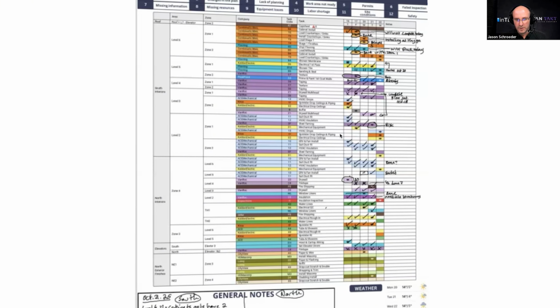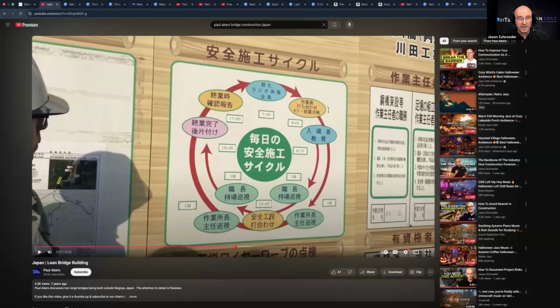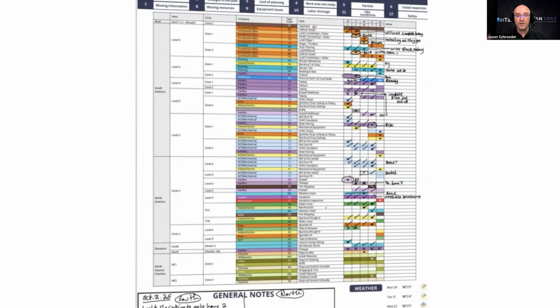And I do want to note that when they're doing this audit, remember, they plan the next day. The afternoon foreman huddle plans the next day. Then in the morning, they orient their workers in the worker huddle. And then they go through and they do their audits. They do their audits with, not Japan, this is the United States tact production system, but that's the time to actually take this in hand and go do your audits and work shoulder to shoulder with the foreman when there are handoffs instead of pushing and yelling at people.